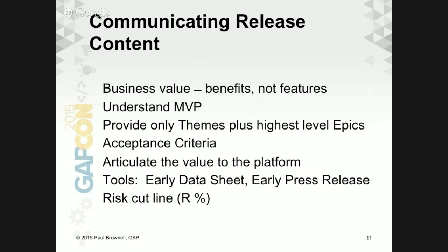So instead of spending a lot of time in analysis, building very big products and trying to figure out what people want along the way, it's a much more agile approach to take the smallest use case that people would find useful, build it, put it in the field, and release that product, and then iterate on it and pivot, add capabilities to it.